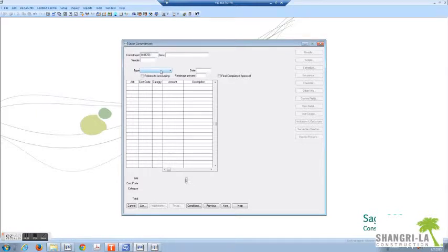Typically, we have the 16 cost codes. Let's say that this is the 15th, the cost code 15. Actually, let's do 09 for things like drywall. And then we will do another dash, and then 01. So this takes up all of the data entry. All of the possible data is entered, and you have to enter the dashes. And the 01 is just the first contract that I'm issuing under the 09 cost code. If this was the fourth, then this number would be 04.